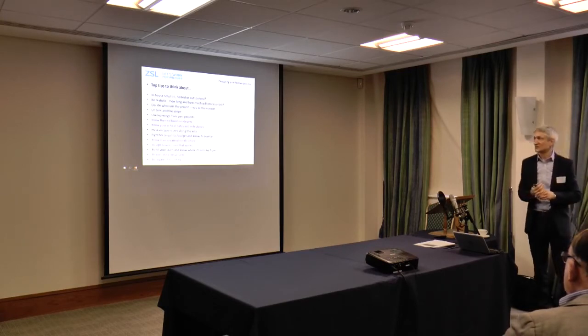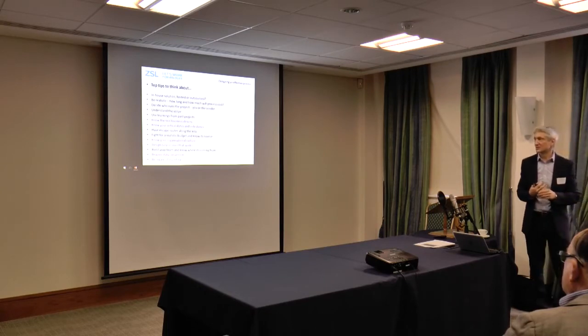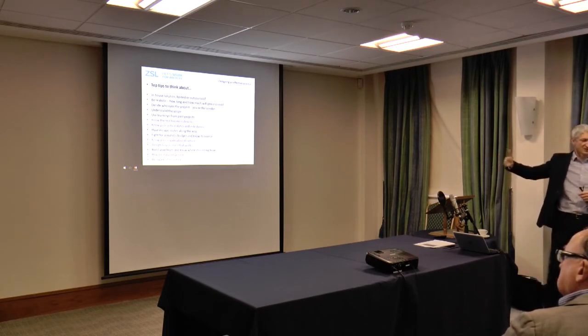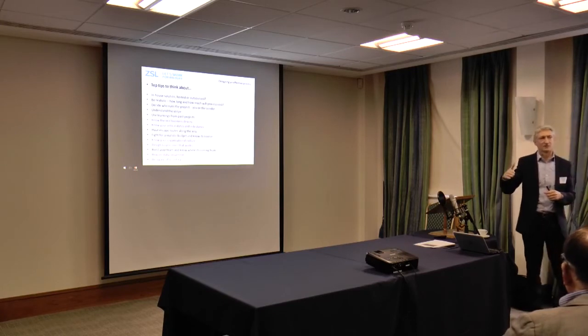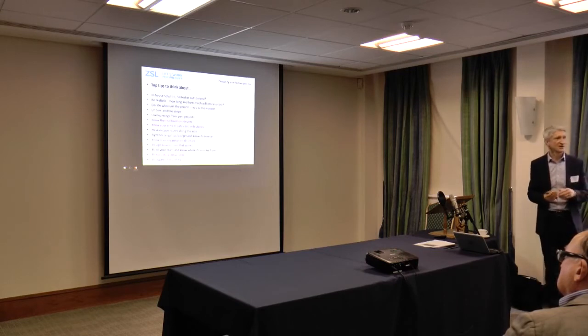Dates and milestones and learning from previous projects, fairly obvious things, but I think just as an observation, we sketched out critical dates, and we had a particular end date, which 2 years out or 18 months or a year out from when it was, seemed okay. As we got nearer, we realised we hadn't left quite enough room between that and go live, so actually we had to do some jiggling. With hindsight, we should have seen that, but it did affect some of the tasks we did.